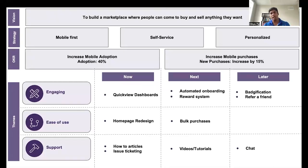We are going to talk about a portfolio roadmap or the leadership roadmap that you would show to a leadership team. And this is an example. And I'll go through how it has been built. First of all, it is difficult to put timeframes on roadmaps, but to be pragmatic, one needs to provide some guidance to leaders or execs and timelines, giving them a feeling of certainty and predictability. So time horizons in terms of like now, next, and later, that works really well. Always list your vision, strategy, and goals or OKRs on the roadmap to ensure that your outcomes tie back to the strategy and vision. You group your outcomes into themes and then break them down into ideas, if that makes sense. And this helps make your strategy more concrete.